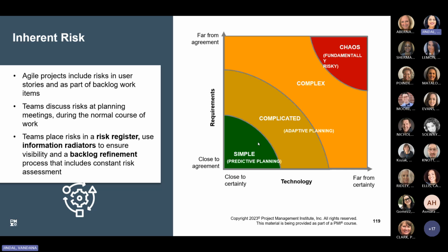On the right side, we have a Stacey diagram. The purpose of the Stacey diagram is to help managers and leaders identify the type of problem that they are dealing with, and which is the most appropriate problem solving approach that they need to use to handle those problems. So the x-axis here is about the uncertainty of requirements, and the y-axis is about the uncertainty of technologies. As you can see, the very first block that we have here in green is the basic or simple zone. In this zone, projects basically have clear requirements and known solutions. To succeed in this area, one needs to just establish checklists, procedures, or maybe best practices. They can use traditional management methods and focus on simple tasks and procedures.